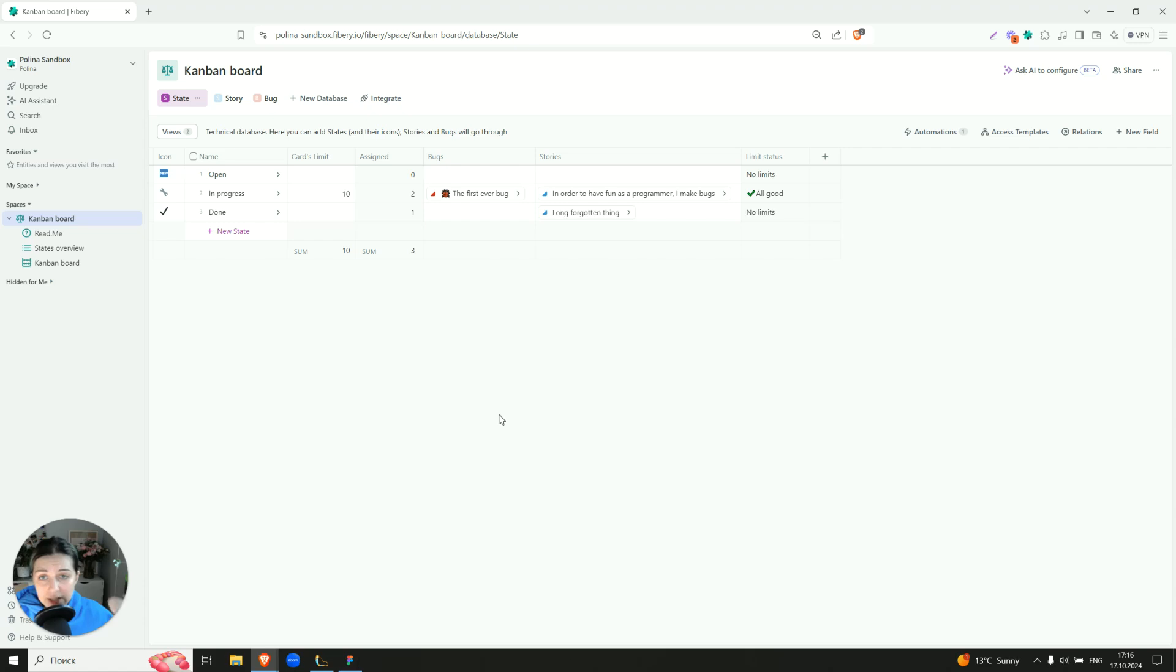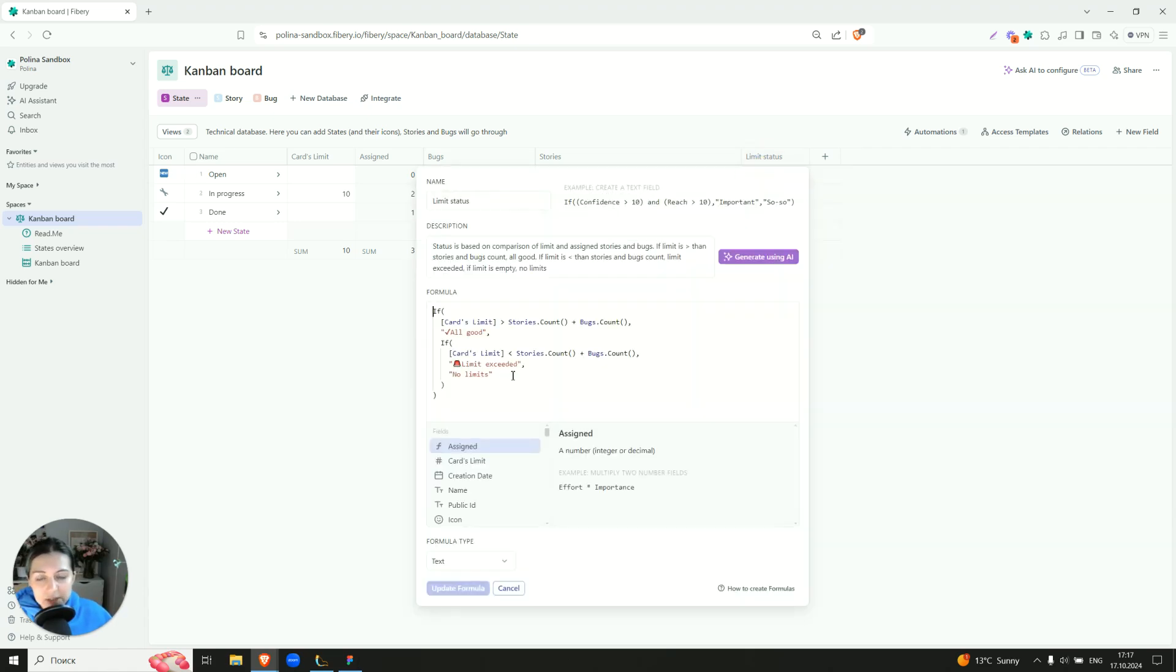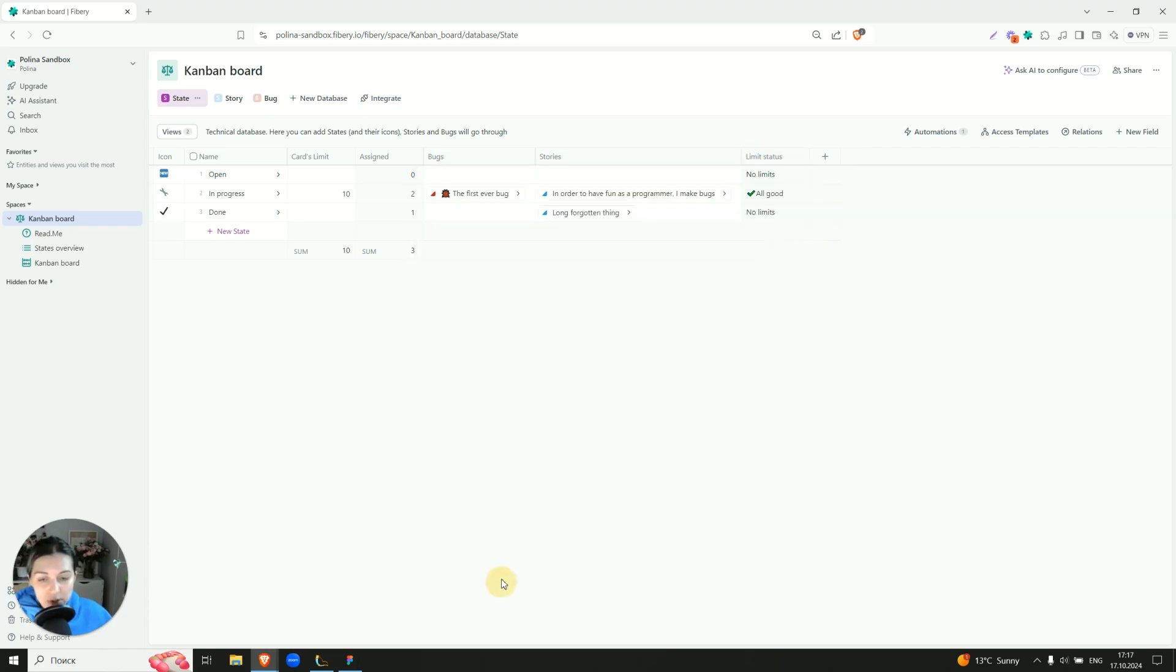If the number of assigned cards are within the limit, all good. If limit is not set, no limit. If something goes wrong, it will show you something like limit exceeded. So you will be notified visually as well.